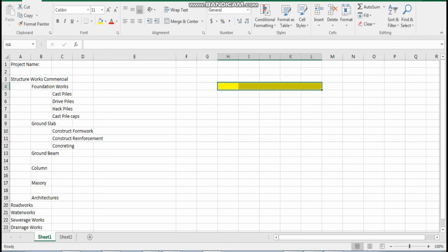So this sequential activities and parallel activities, some activities can be parallel with one another. It's not like everything has to be sequential. There are some activities that can be done together. For example, structural work can be parallel with waterworks, with civil works. There's no harm to it at all, you see. But you need to think about it properly also. Like you need to think about access road, whether you're disturbing the access of the bricks and mortar and everything to the building work, by doing some work outside the area, and then you stop the machinery from coming in. So these are some issues. So sequence is very important, okay?